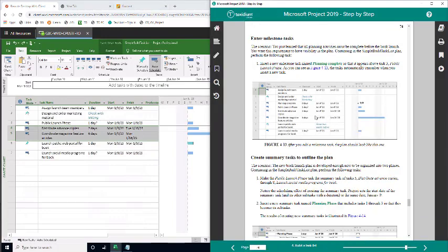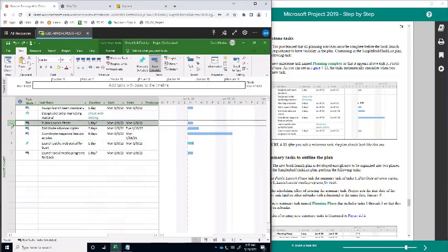We are going to select these tasks. Okay, what I need to do is first I need to add one milestone here. Okay, we're going to insert one milestone. Milestone essentially is a task that has no duration, unless you specify otherwise, and it will show in a different way on your project file. Okay, let's do that. Insert a new milestone, and this milestone will be named planning complete, and it appears above task 3. So I'm going to just place my cursor here, just select the row or the task, and under the task menu, you will go to the insert group, and in here you have a few options.